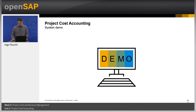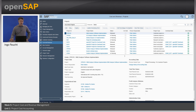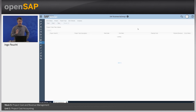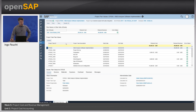With this, I would like to come to the demo. We talked a lot about valuation strategies — here you can see what kind of valuation strategy was taken to evaluate the planned quantities on the project. For this, we go to the work center Cost and Revenues and go to project CPS06. I have defined a view here because we have many projects. You can go in and view the planned values. This is the financial representation of the project — finance and projects are very tightly connected for planned values as well as actual values. We see the planned values and how they are evaluated, with the project structure showing overall planned costs of 39,000 and planned revenues of 95,000.